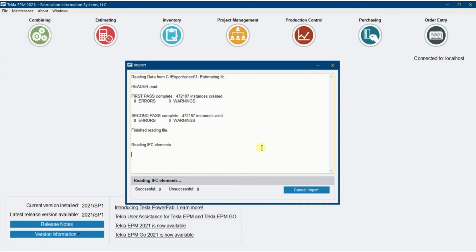A couple points to think about. Know what is in the model. So if you begin Estimodeling, you really need to have some sort of detailing standards when you do it, so you know what is coming in. Is welding coming in? And if welding is coming in, is that all of the welds? Having part of the welds is almost as bad as not getting welds. So are they coming in? Are holes going to come in? Are copes going to be coming in?